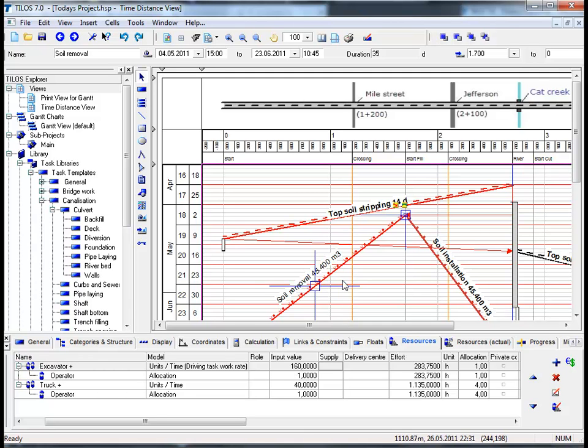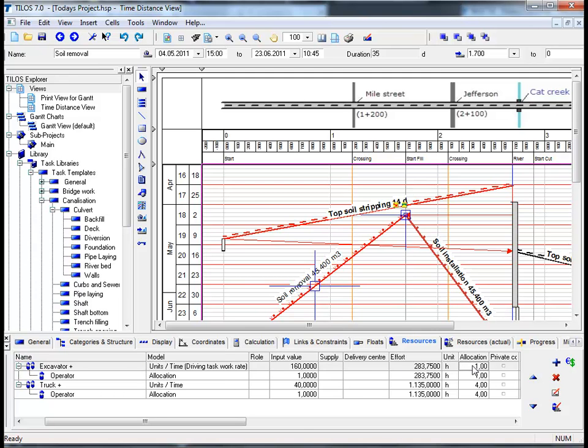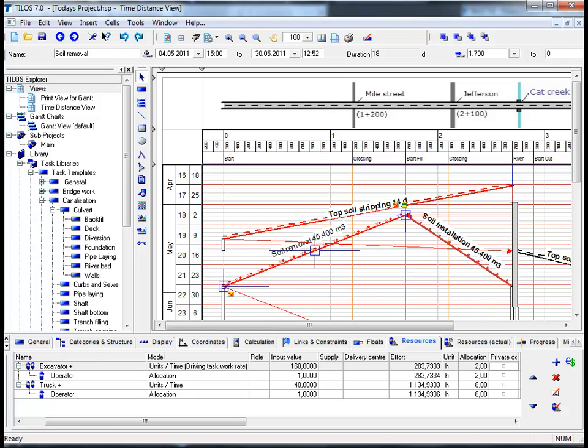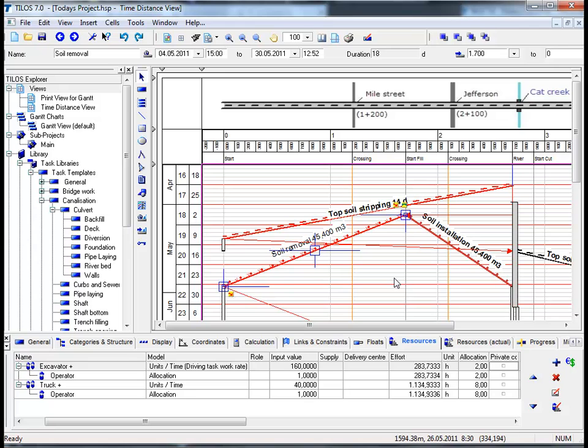If we move back down to the excavator and want to change the number of excavators to 2 as opposed to the allocated 1, insert the number 2 and hit the return button. We can see now that we require a total of 8 trucks including the driver, the operator. Again, we can see that in the main working area above, Tylos has graphically updated the working schedule.